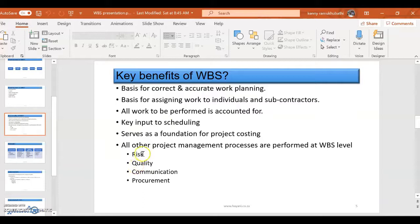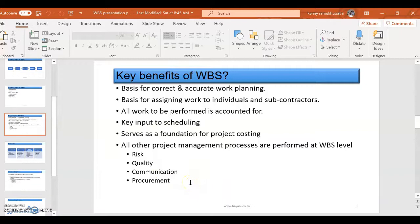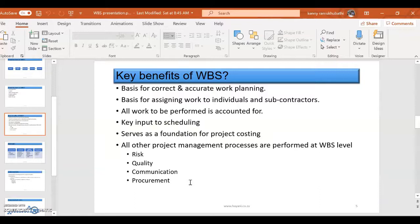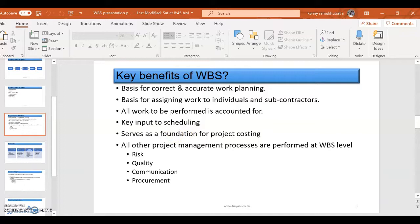The other issue is that all other project management processes are performed at Work Breakdown Structure level: risk, quality, communication, procurement - actually everything else. So once you've got a work package, you are able to do risk management on a work package, you can do quality management on a work package, communication and procurement. So as an organization, you will decide what level you're going to be doing any progress reporting or work performance data reporting. So that's now the summary of the key benefits.